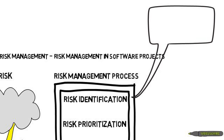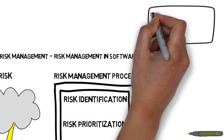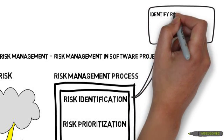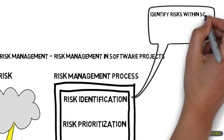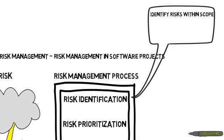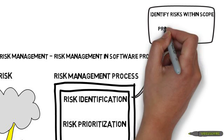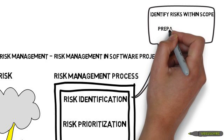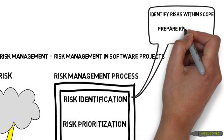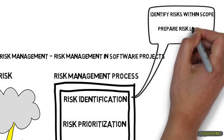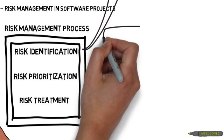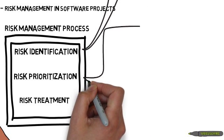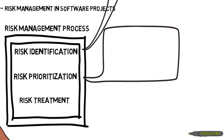In risk identification, risks are identified within the scope of the project. Risks can be identified using a number of resources like project objectives and risk lists from previous projects. For example, if certain areas of the system are unstable and those areas are being developed further in the current project, it should be listed as a risk.